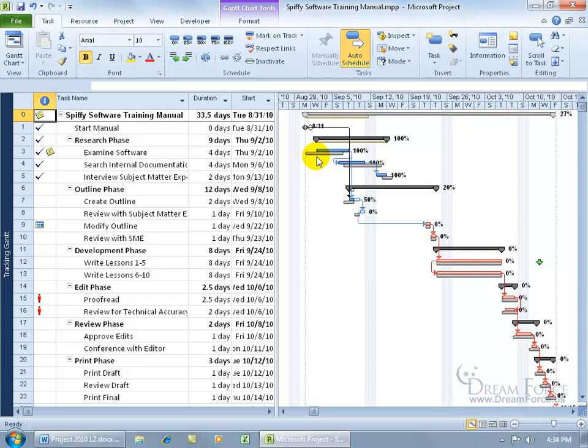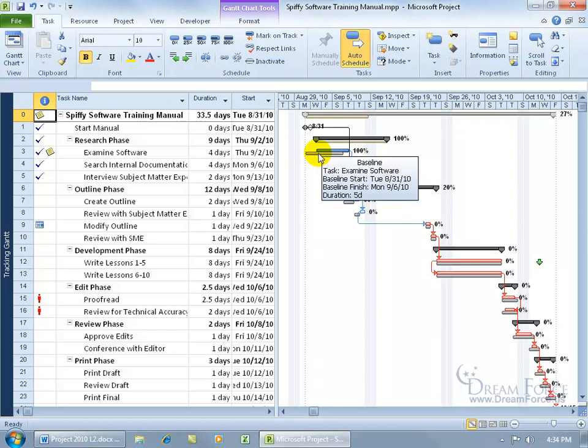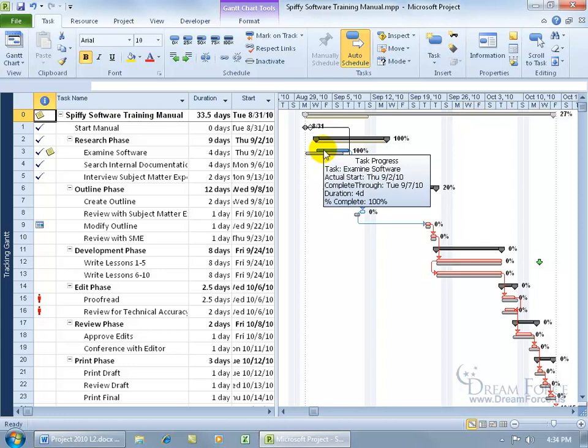If I didn't know my project here and the task that we just covered, it was two days, then I could go ahead and hover over the bars. Okay, it was supposed to start the baseline August 31st, and let me come up here and hover over what actually happened. It started Thursday. You can see in the pop-up September 2nd.